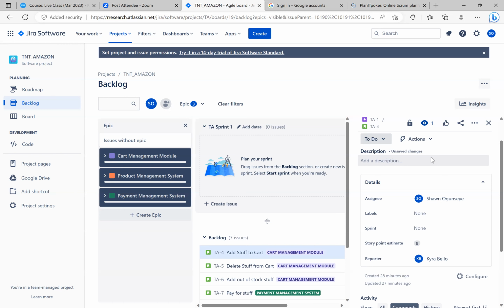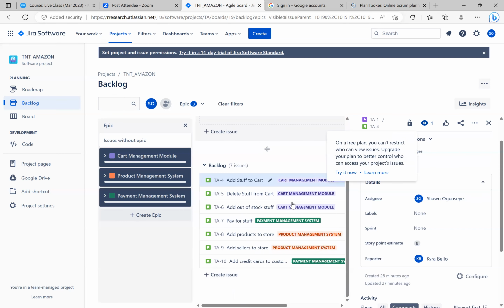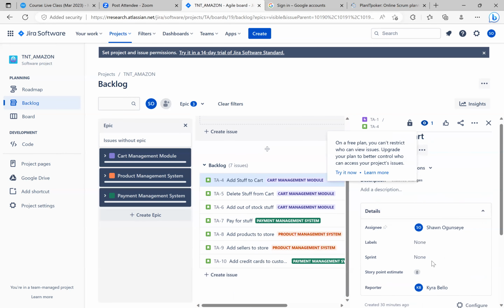So now I'm stepping into what a Scrum Master will do. The Scrum Master will ask the people that chose high numbers, why do you think this task is 40? What do you think the task is about? They can explain, and when they explain, you may find that they are overthinking things. Maybe they are assuming things that the story does not require of them. With that information, you can help them see why the story should have a lower story point. So that's how story points come about.